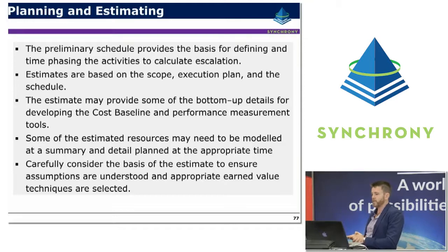Some of the estimated resources may need to be modelled at a summary level and detail planned at the appropriate time. So this is very similar to the concept of rolling wave planning, the whole idea being that developing a performance measurement baseline isn't about creating a detail plan right through to the final end of the project. It's about detail planning the stuff that you know, the aspects that you're certain about, and rolling up the things that are still fairly uncertain to the appropriate level of detail to be broken out at the appropriate time when we're ready to set the baseline or to create a work package for those particular work packages.